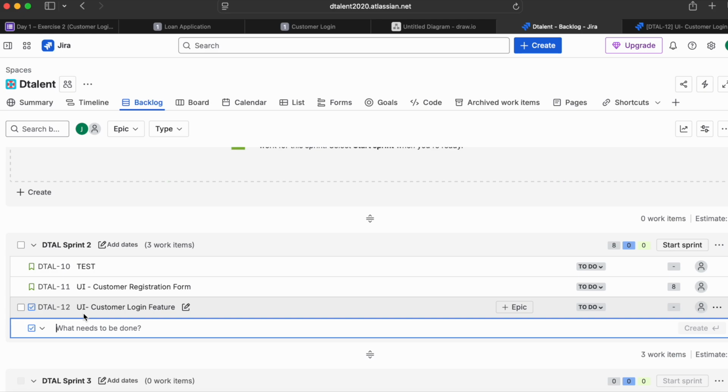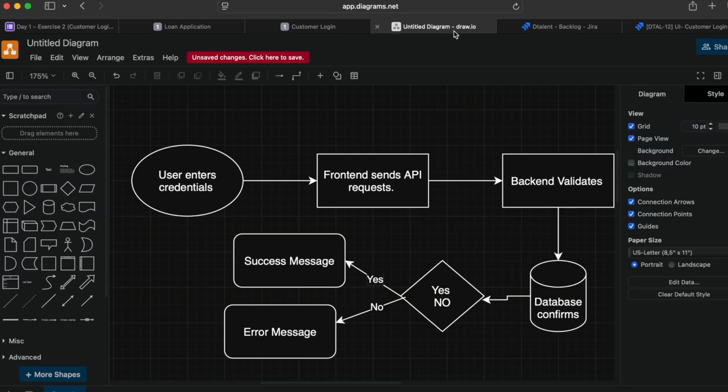if you take everything in total, maybe 10 story points, we would estimate all the work. But since we are only focusing on the front end, I would say 5 to 8. Again, these estimations are based on complexity. I'm just giving an idea for when you talk to your engineering team, so you can explain the flow. We need an API to take this information and send it back to the backend, right? So we are not writing the API user story, we are only writing this one.